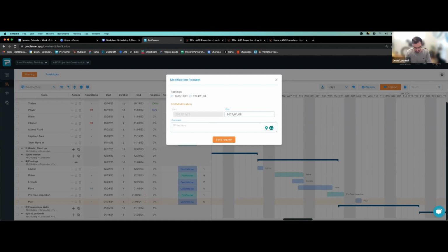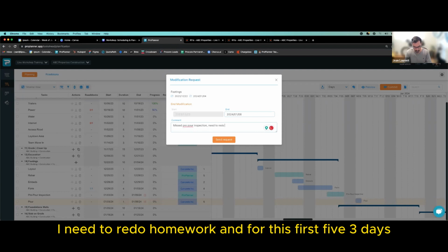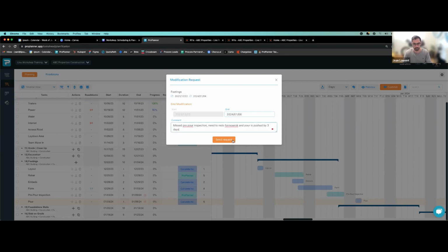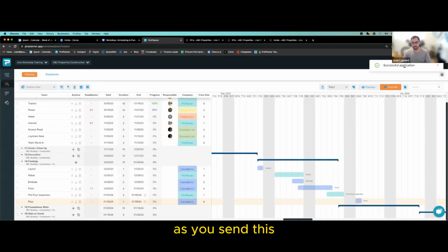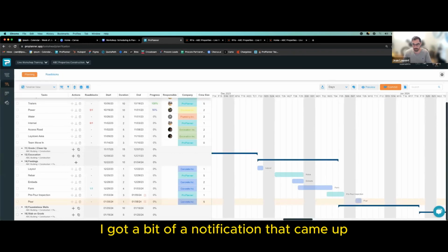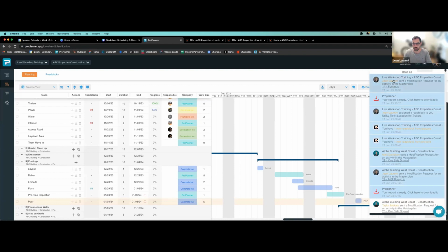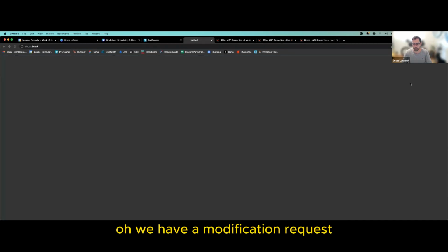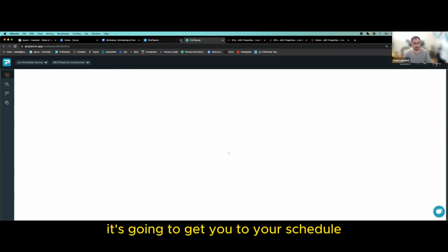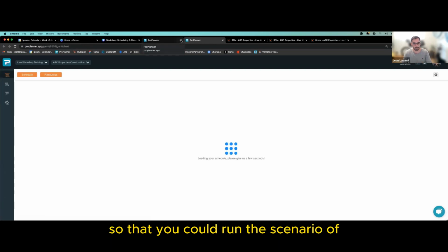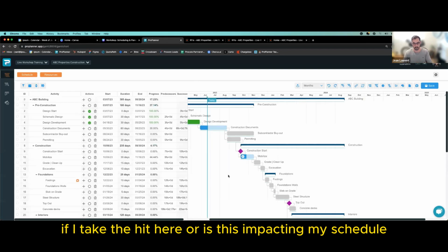So in this case, missed pre-pour inspection, I need to redo homework and pour is pushed by 3 days. As you send this, whoever is in charge of the schedule, you'll see here, I got a bit of a notification that came up. Oh, we have a modification request. Let me click on it. It's going to get you to your schedule, to that modification request, so that you could run the scenario of, if I take the hit here, how is this impacting my schedule?